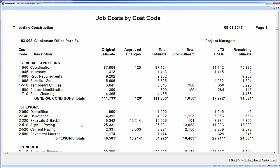In here, this report is showing me what my original budget was, if I had any approved change orders that modified my budget in any way, what my new revised budget is, any commitments I had against these particular cost codes. Again, commitments are subcontracts or purchase orders. My job-to-date costs by cost code and my remaining costs, which is calculated by my total estimate minus my job-to-date costs.